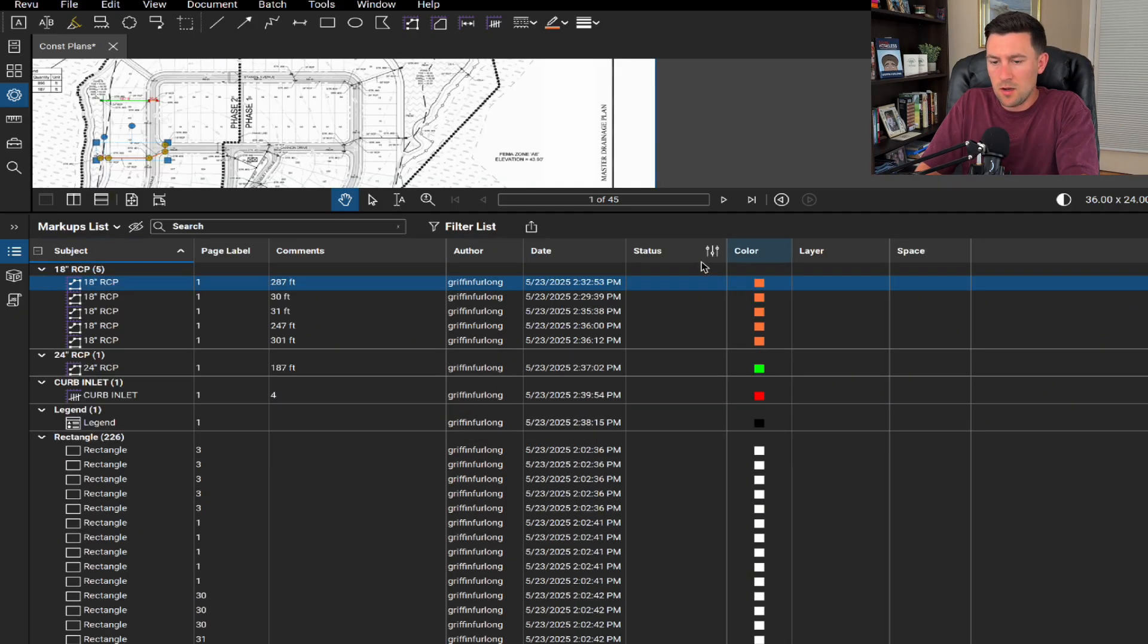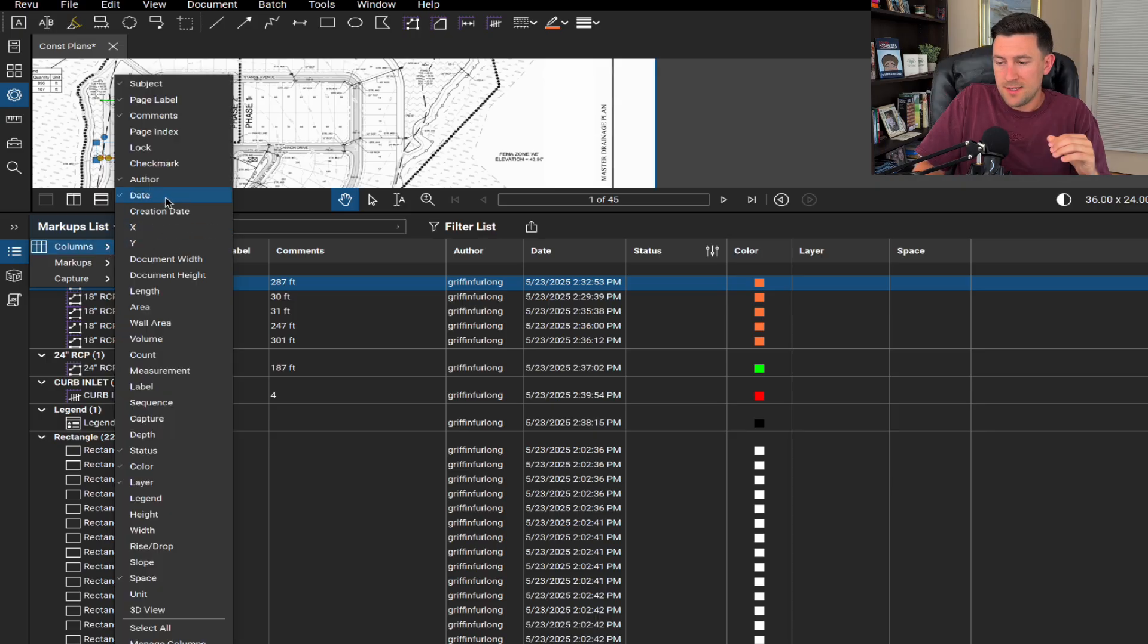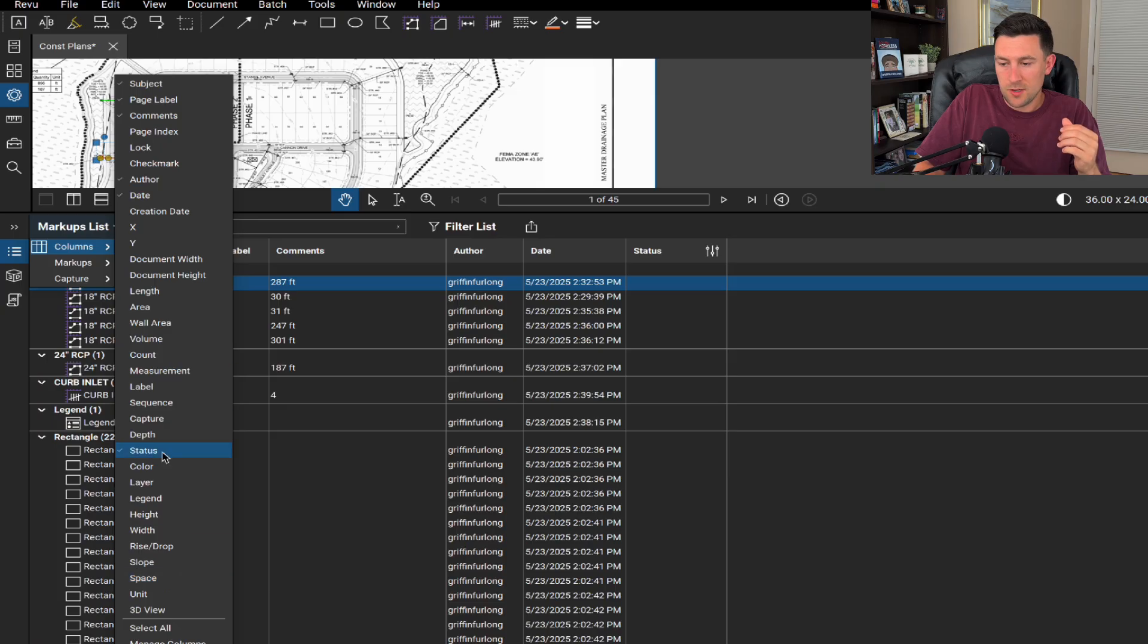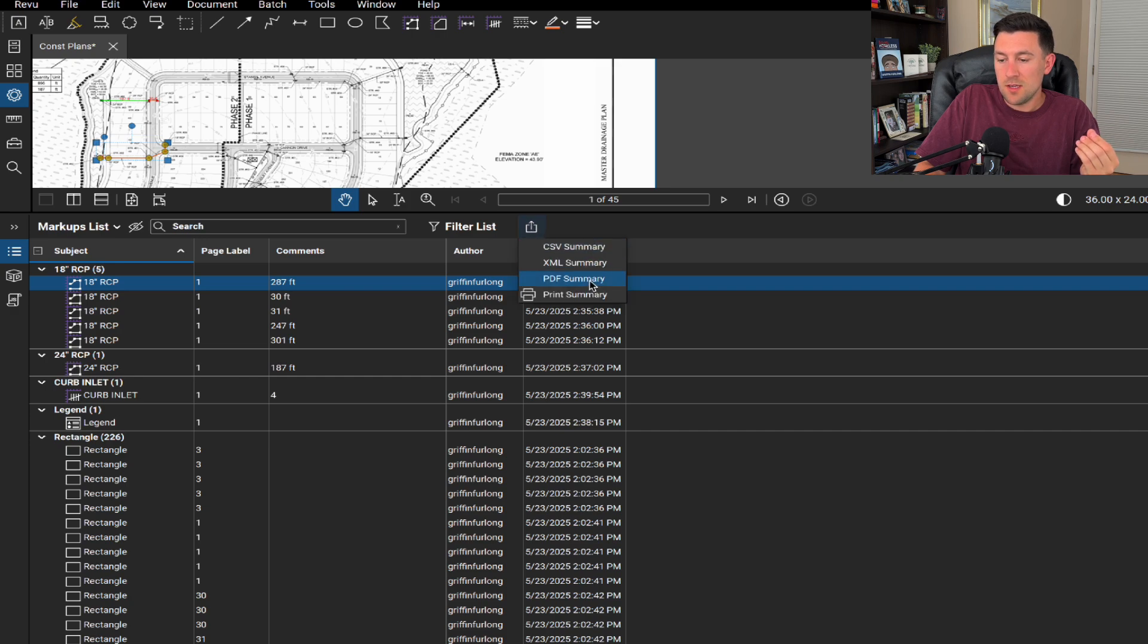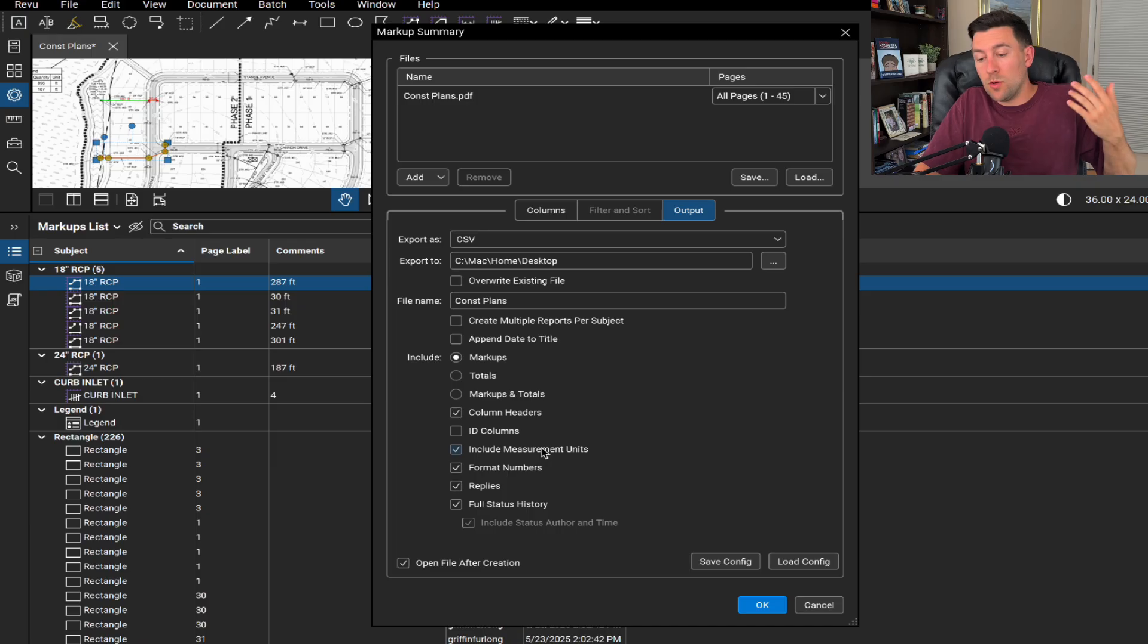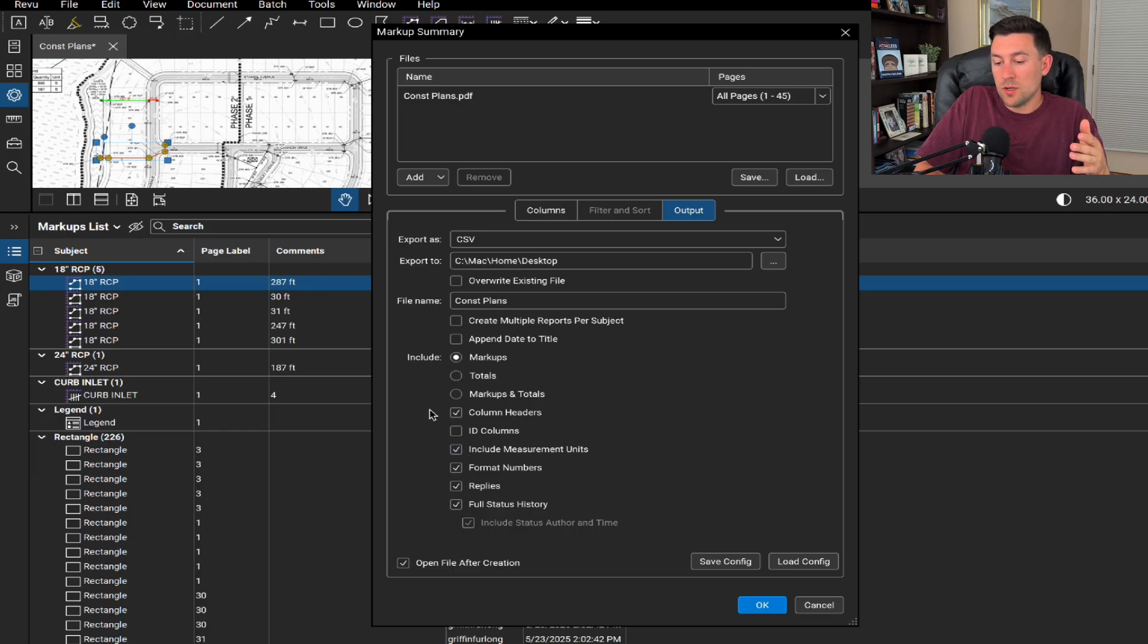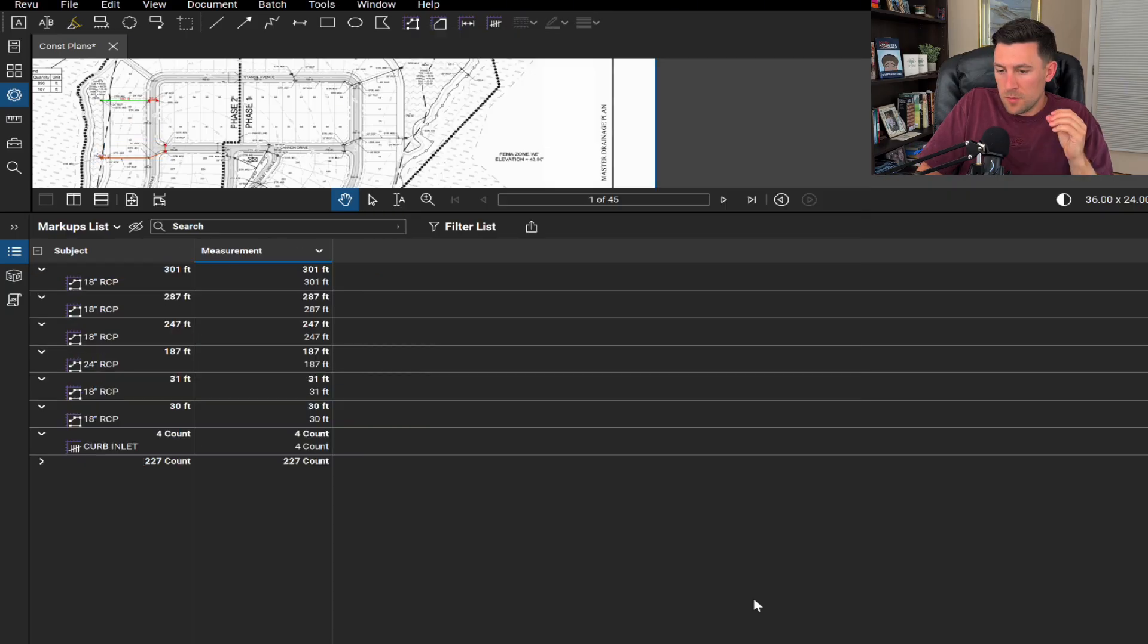In order to edit all of these columns, you can go up here to markups list columns. I don't really need the date, at least for this. I technically don't even need the color because I'm just trying to export this to do a cost estimate. So I don't need the layer, I don't need the space, I don't really need the status. So I'll leave it like that for now. And if you go up to this export right here, this little export button, you can do a CSV, you can do a PDF, or you can just print a summary right there. So I can export a CSV, include measurement units. Okay, this is actually important. So do I want to include the measurement units or not? You can if you want to, if you're using this for a cost estimate, I'd highly suggest you just don't include the units, you should already be aware of what the units are. This will make it easier once you summarize things in Excel. So I'm not going to include the units. Then we're going to press okay. Let's see what we got.